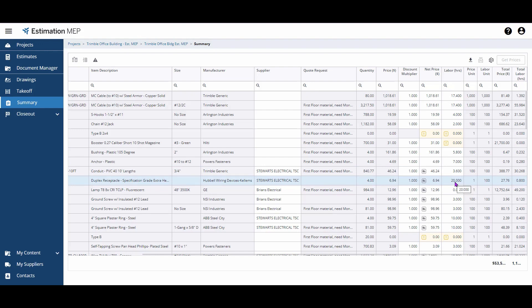You can modify the labor here that corresponds to the appropriate labor unit. Essentially, this means, for example, 20 hours per 100 items. Keep in mind that when making an adjustment here, it will change the labor for that item anywhere it appears inside of your estimate.